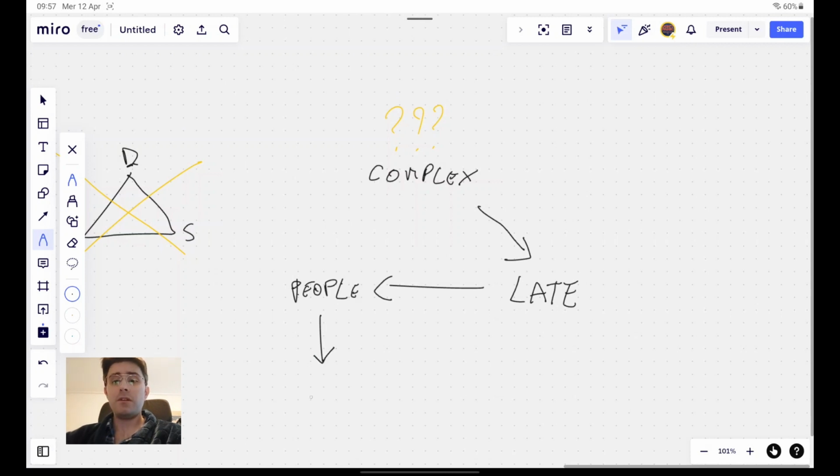But again, we are dealing with complex tasks here, so it means that the people that are currently working on them, they need to switch their focus in training the new people in order for them to be productive, which in turn reduces the time that they can dedicate in their own task, causing further delays, making us more likely to miss the deadline. At this point, what do? Do we add more people to try to meet the elusive goal, or do we accept that the deadline needs to be shifted?